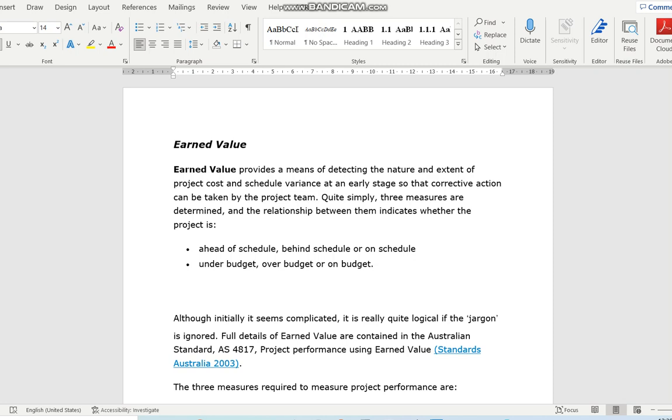If we go to our physical S-curve, if you key in those percentage values and do your EV minus your PV, then if it's a negative value, that is your schedule variance. But through your financial S-curve, you can also do the same thing. On the financial S-curve, the first curve that you do is PV. It's your budgeted cost of the work scheduled. That is your first curve. And then the budgeted cost of the work performed is your EV.